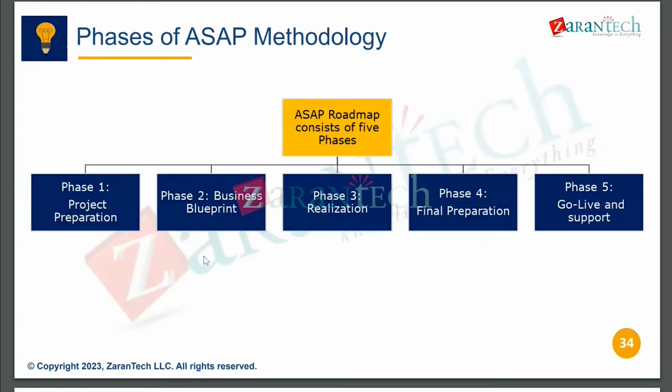Some FI activities, these kinds of things, master data, everything will be uploaded in the technical go live phase. Once technical go live is successfully completed, then we will release the system to the business for the actual go live, where the business can use the system and run the day-to-day transactions. Once the system is released to the business, we'll provide go live support. Go live support is free of cost for a certain period of time.